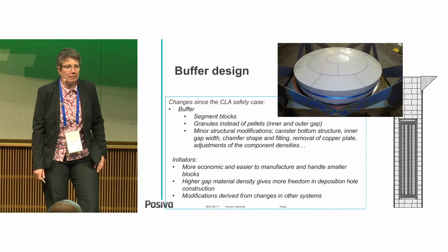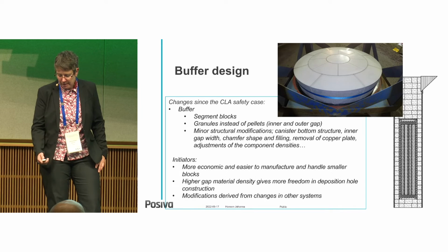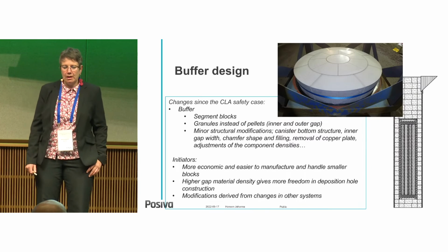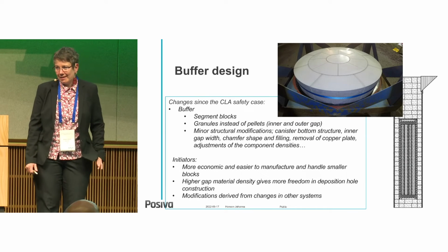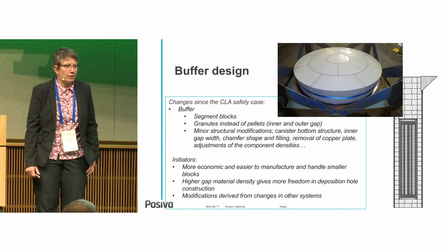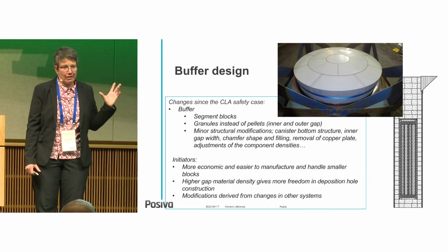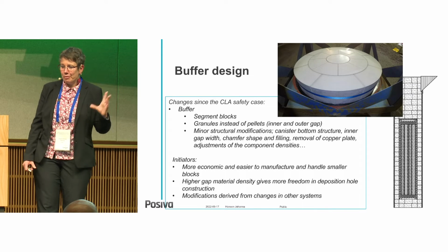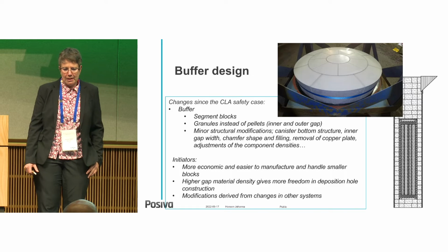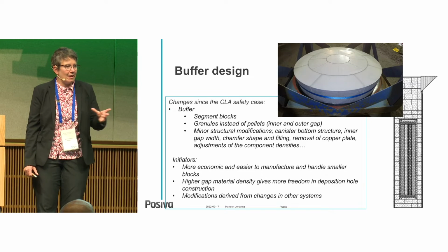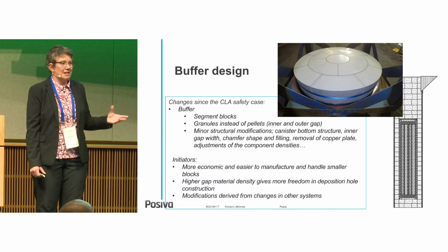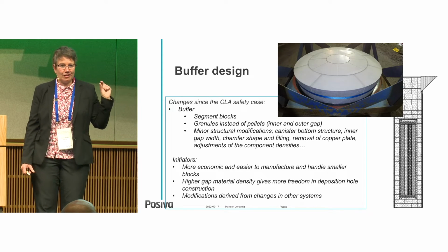Yeah, if we start from the buffer, so now the current design for the buffer consists of these segmented blocks. And that's, as Tiina explained in her presentation, so basically the reason behind it was that then we have more options to manufacture, and maybe it's easier to purchase the components when there is more variability for the suppliers. Then another important thing for the buffer, Tiina also mentioned, was that we had really tight tolerances.